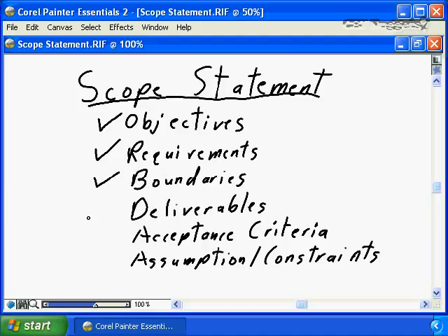You need to define the deliverables at the appropriate level of detail. Is it simply a list of deliverables for a very small, simple project? Or is it a fully defined list of deliverables with tables of contents, an estimated number of pages, and narrative descriptions for each element in the table of contents for very large, complex projects? But with a combination of the boundaries and what's in scope and not in scope, you can fully define what it is the project needs to deliver.